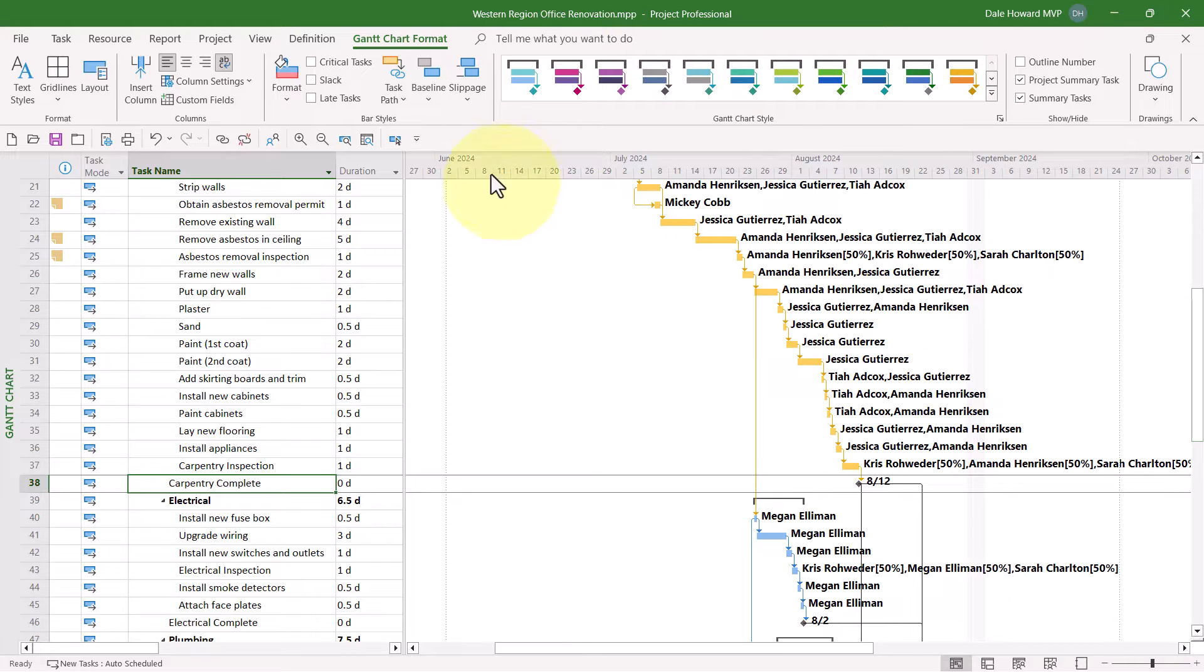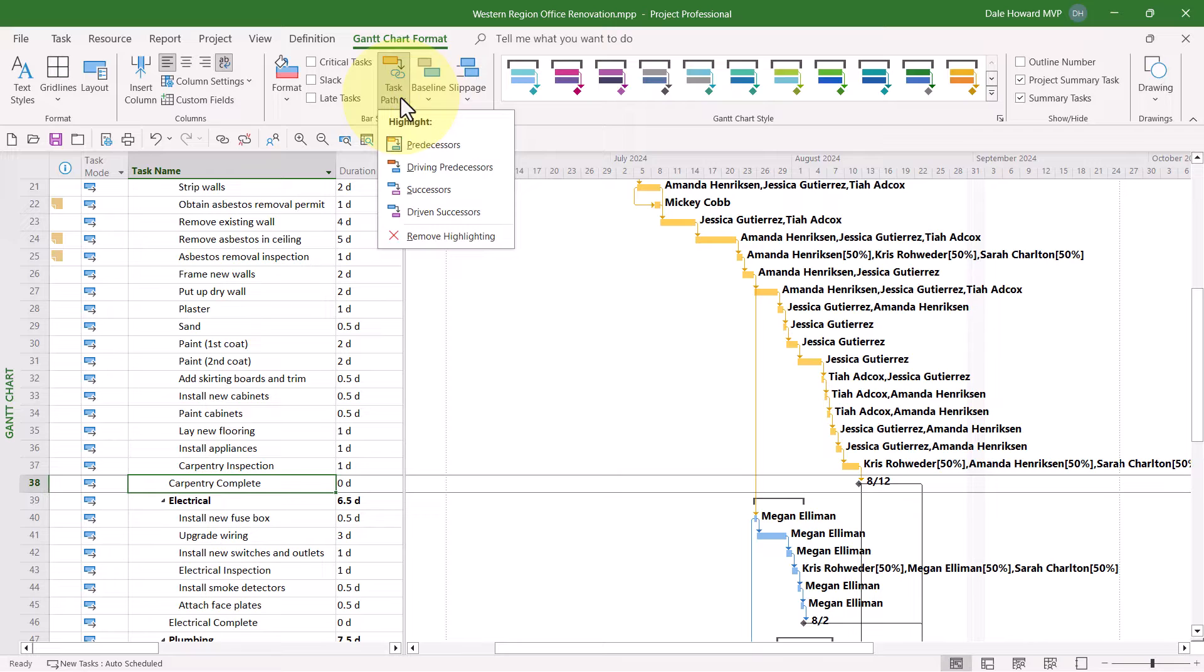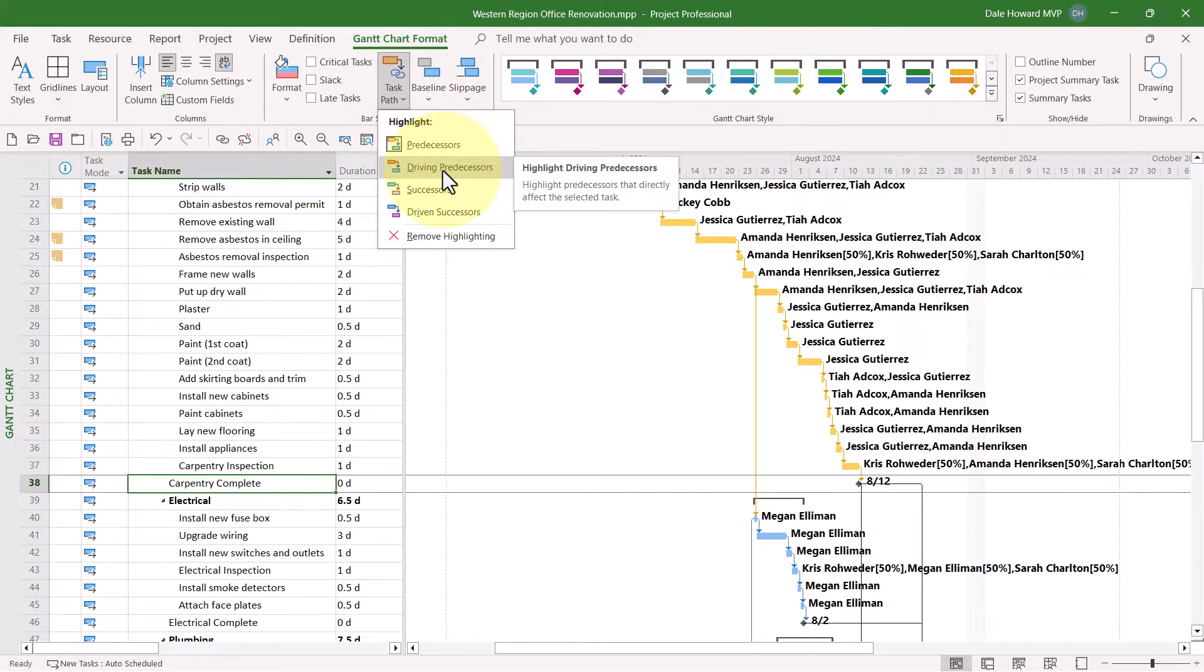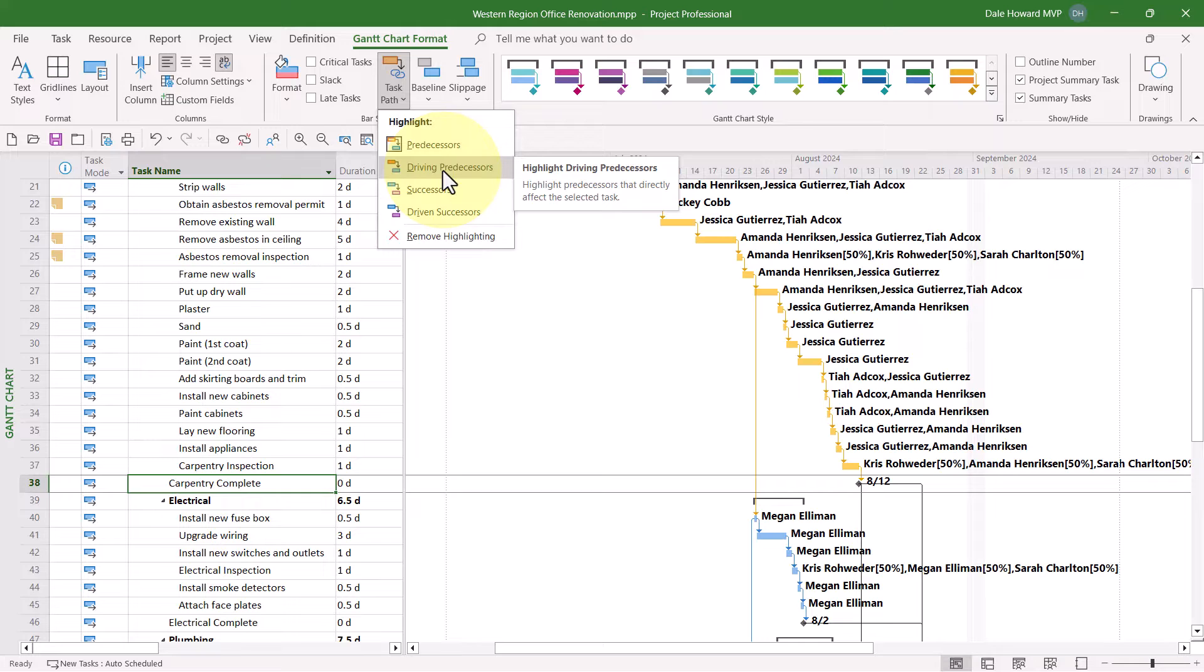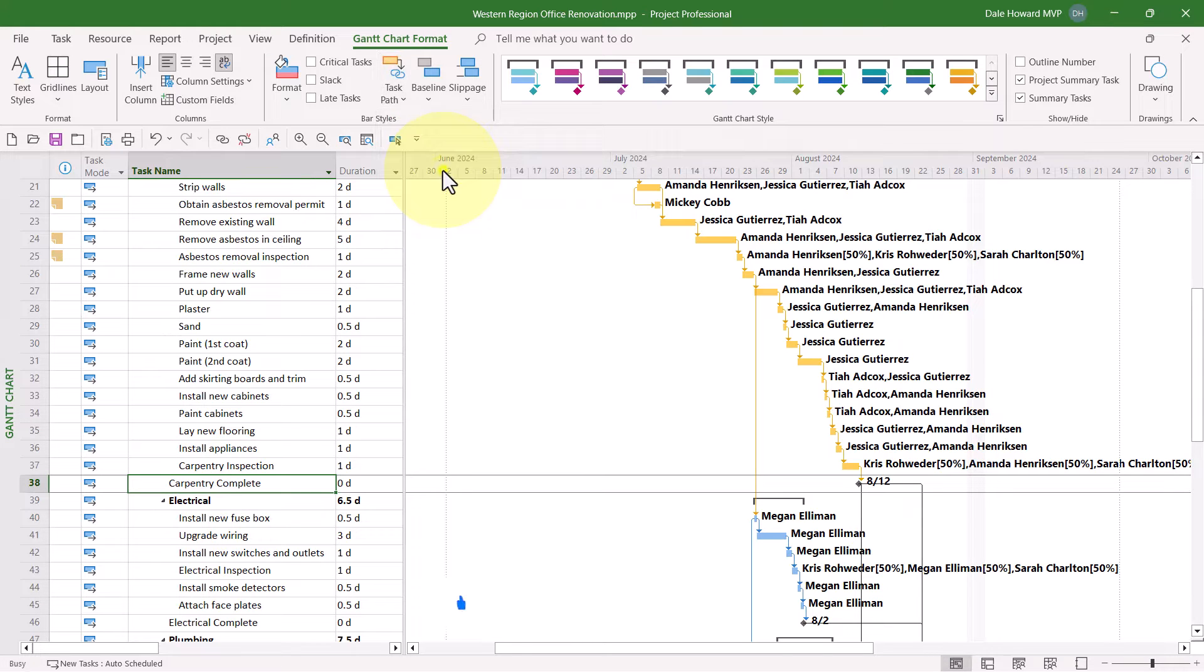Next, I'll click the Task Path Pick List button again, but now I want to see which predecessors are actually driving predecessors that are driving the start date of Carpentry Complete.